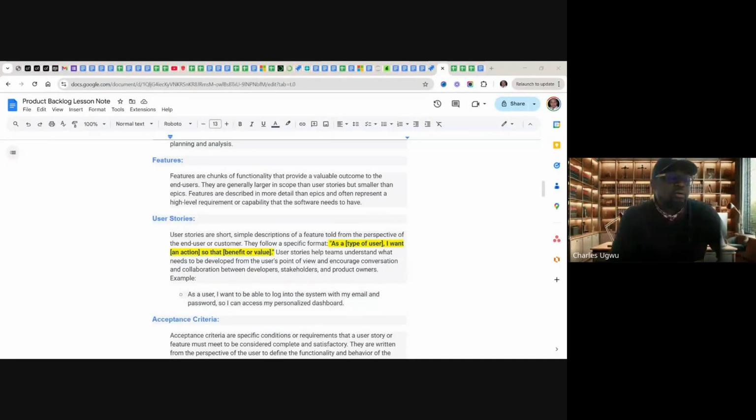It has errors. That is where the bugs come in. And if you click and it doesn't work, then the acceptance criteria will reject it. According to the acceptance criteria, once a user clicks on the camera icon, the user should be able to select and send the picture to whoever the user wants to. If a user cannot perform that operation, it must not be accepted. That's what we call acceptance criteria. So if you miss any of these, it cannot be accepted.